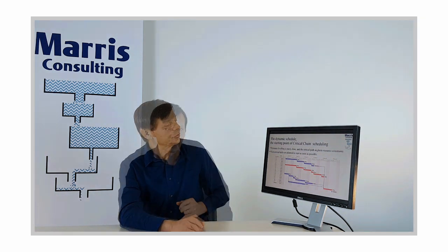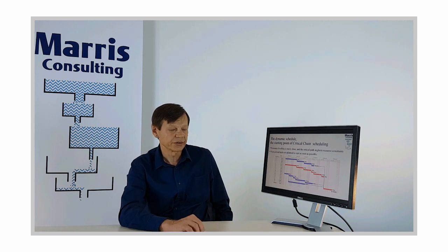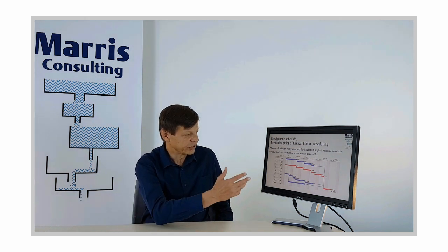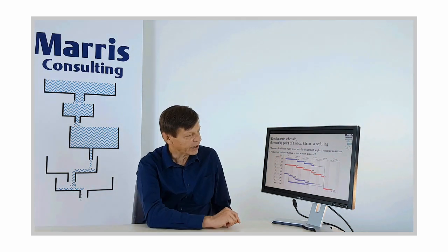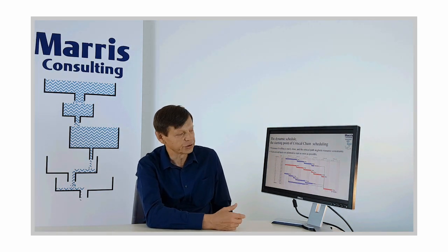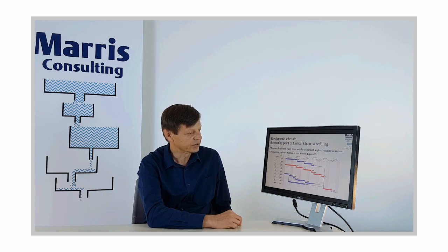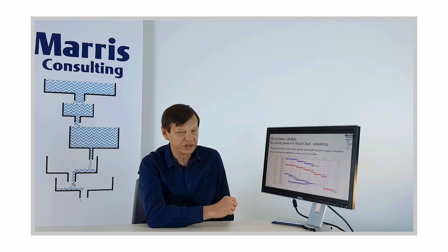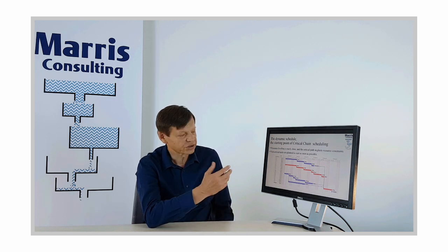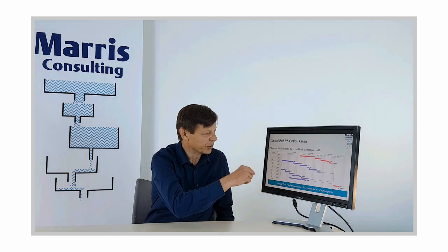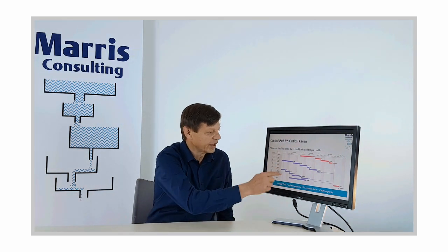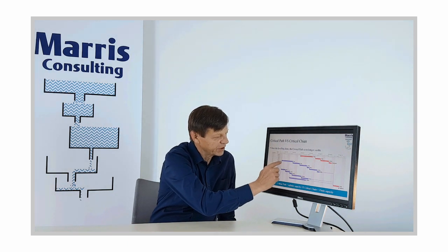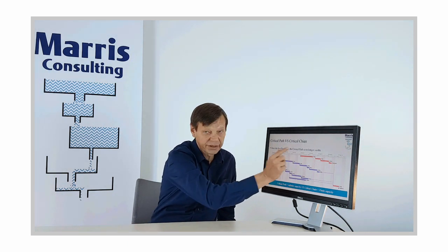So what do we do? Well, the first thing to underline, of course, is that presented in this way, the critical path does not take into account capacities, and therefore it's not giving you a realistic duration. And to understand what that realistic duration could be, you need to level that schedule, and most project management software enables to do that. You press on a button and it takes into account the capacities of the resources, and so for instance here it's decided that Peter will do first this task, then that task, then that task.